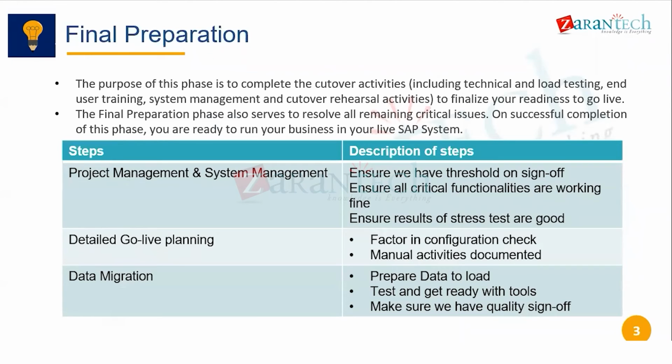For the data migration, you need to prepare all your tools first of all. So let's say we are having LSMW tools for all the data migration. Let's say you have one for balance migration, and one for creation of the legacy assets. You remember the transaction code AS91, for the transferred assets, where you upload the asset along with the accumulated depreciation. Yes, right. So those tools you need to get ready with. You will have all the data, and you will also do a test load in some pre-production client.